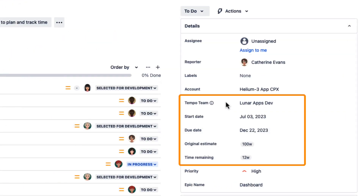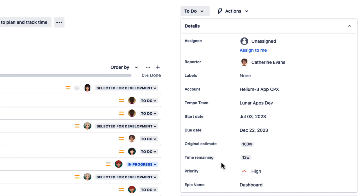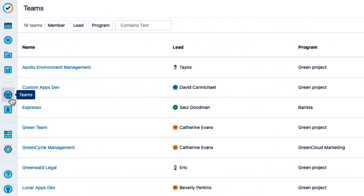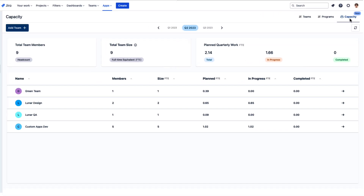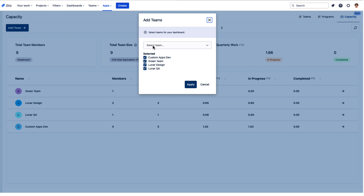These fields make up the data that Tempo needs to automatically display each team's timeline and capacity, and also to calculate the full-time equivalent, or FTE. With that setup done, let's get back to Tempo. From the Teams page, click Capacity up at the right to see the Team Capacity Dashboard, and select the teams that you want to view.